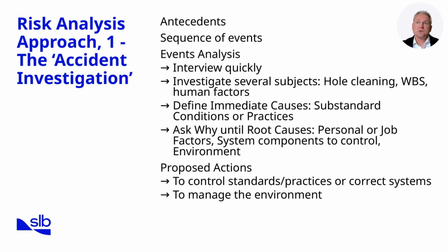This leads us to the root causes, which often fall into categories such as personal or job factors, inadequate system controls, or environmental conditions. Once causes are understood, proposed actions are developed. These may involve controlling standards and practices, correcting systemic flaws, or managing the environment more effectively. The value of this approach is that it turns hindsight into lessons learned, helping prevent repeat failures. However, it is inherently reactive because it analyzes events after they occur. To balance this, our next approach looks forward, integrating risk considerations into design and execution before problems arise.